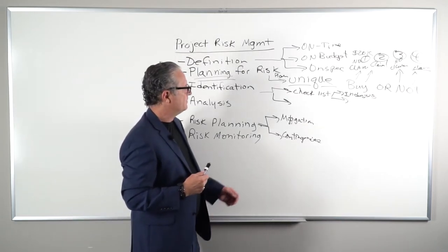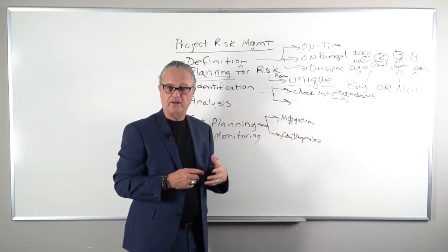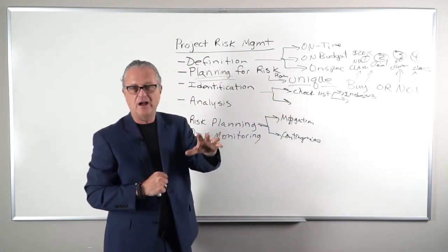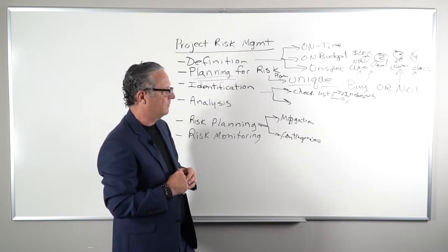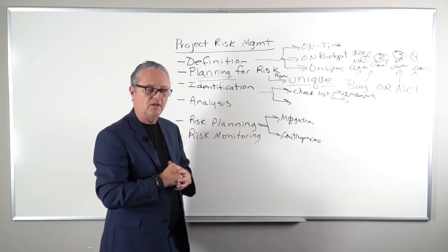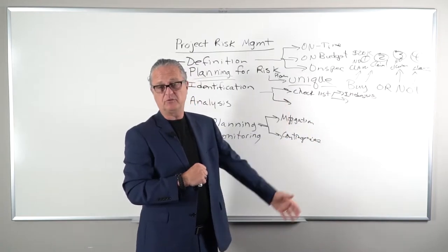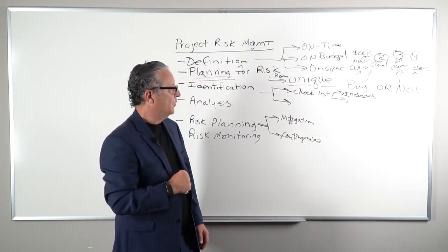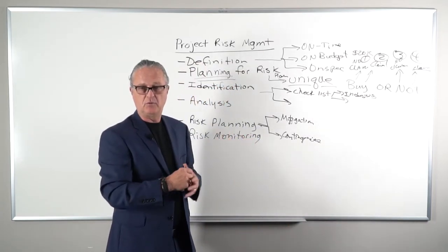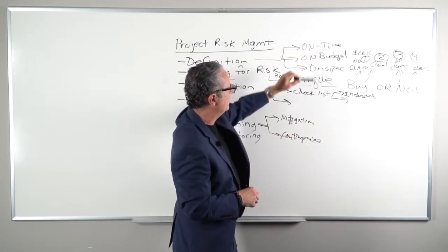Okay, so if we had an example, we might see categories in a checklist, just like we would see lifestyle categories in a life insurance application. So a checklist around technologies, a checklist around sponsorship and funding, risks in a category of outside help, or just resource management in general, okay? We can talk about categories around the project plan, and there's a lot of things, right? We could talk about the budgets, the schedule specifically, right? These are the threats that we're looking at.